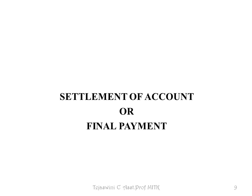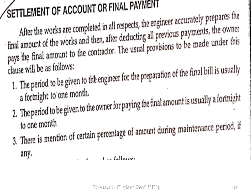Now we will see what is Settlement of Account or Final Payment. After the works are completed in all respects, the engineer accurately prepares the final amount of the work. After deducting all previous payments, the owner pays the final amount to the contractor. The engineer will calculate the final amount, give it to the client, who will then deduct all previous payments and pay the contractor.